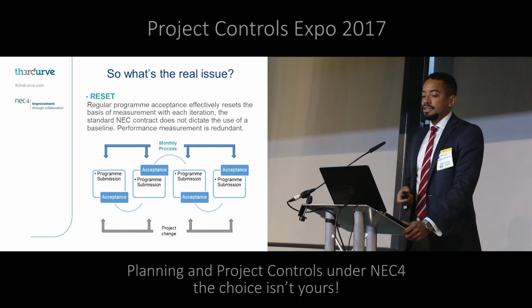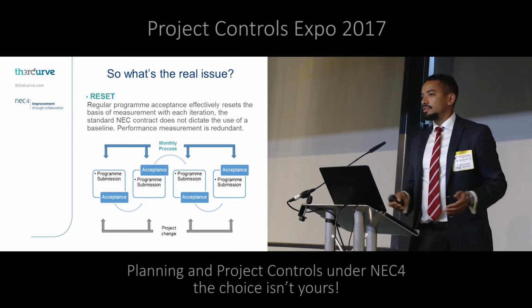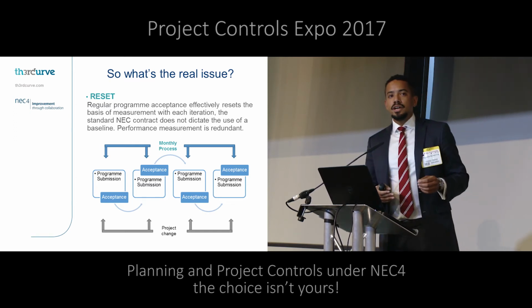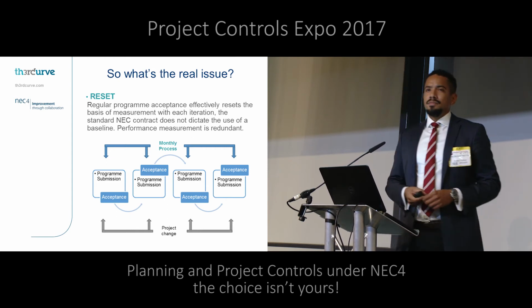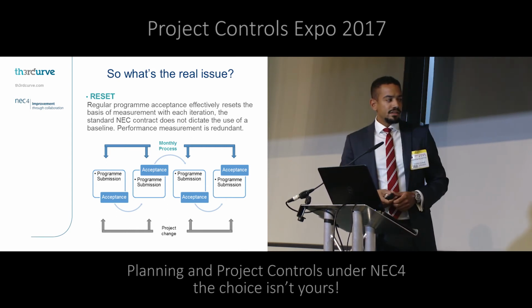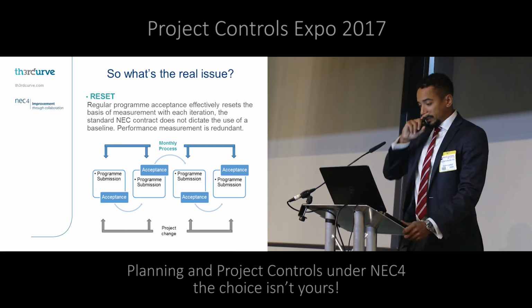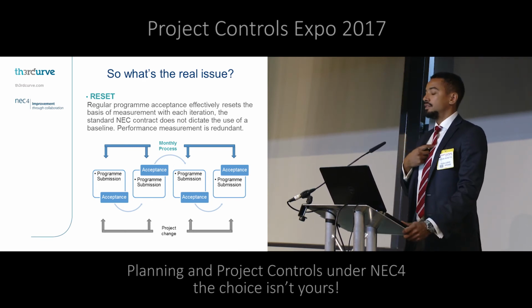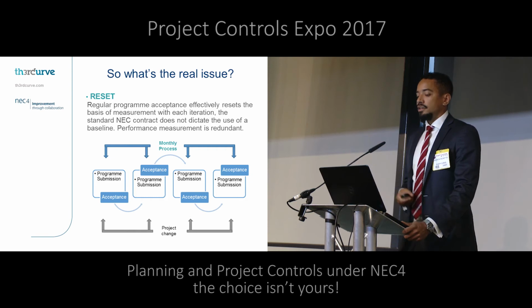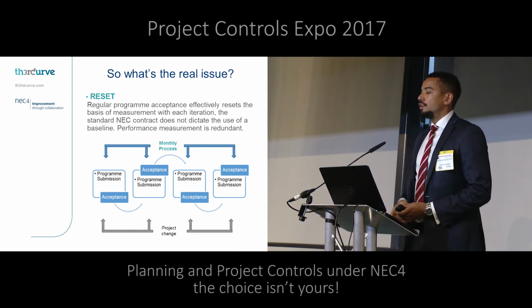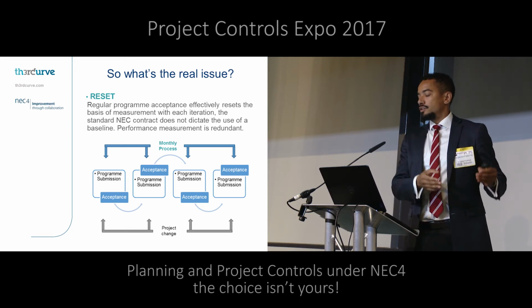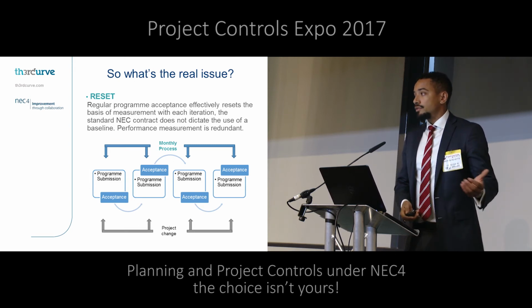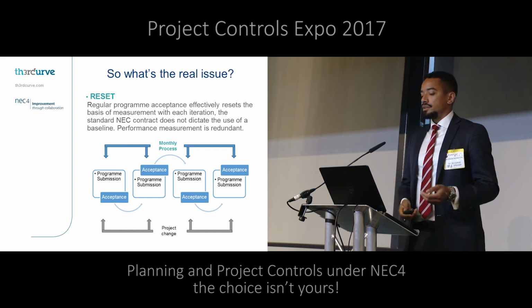You've got to work with the team. But regular acceptance of a program effectively resets your baseline position under the NEC contract. The NEC contract doesn't recognize baselines in the traditional sense. I don't even think they're mentioned anywhere in the contract. This is a problem. Me as a client, you as a client, anyone as a client, if you haven't got a baseline that you're measuring from, you've got a contract that's being administered, but don't have a reference point in that contract to say, this is what I asked for originally, there's a fundamental issue.